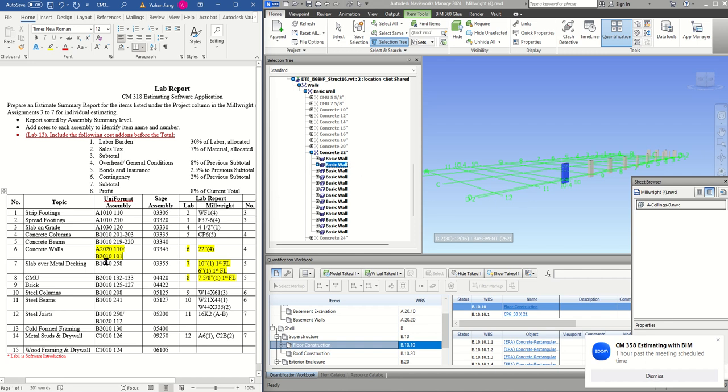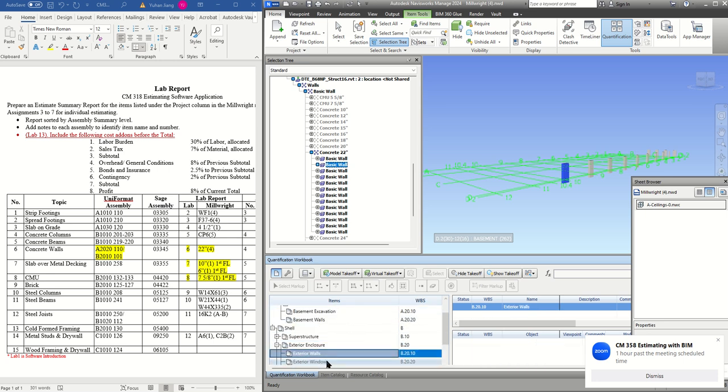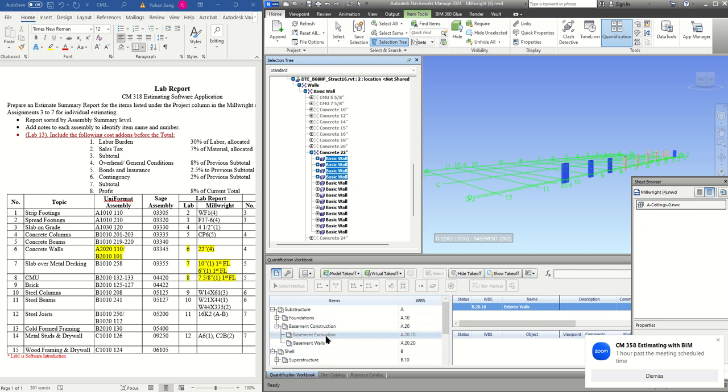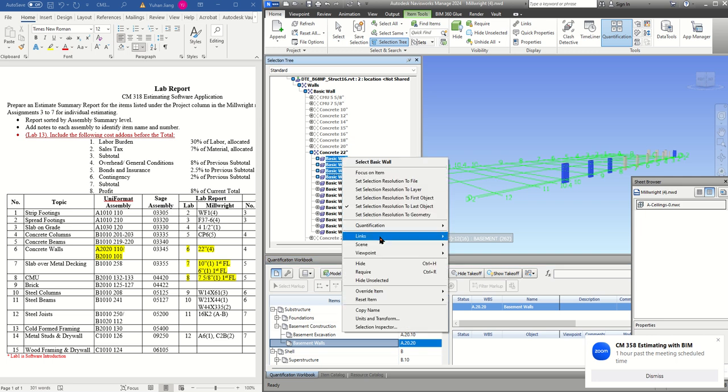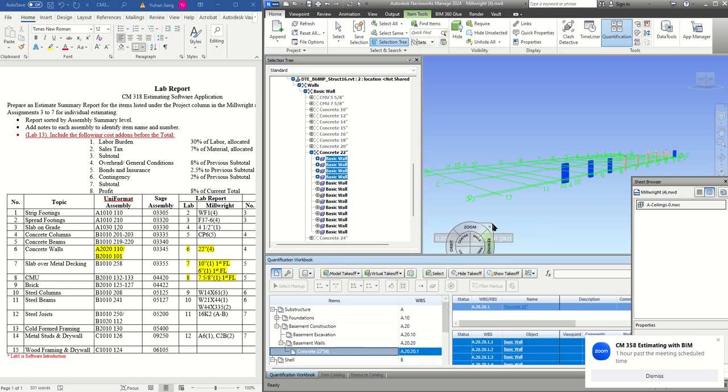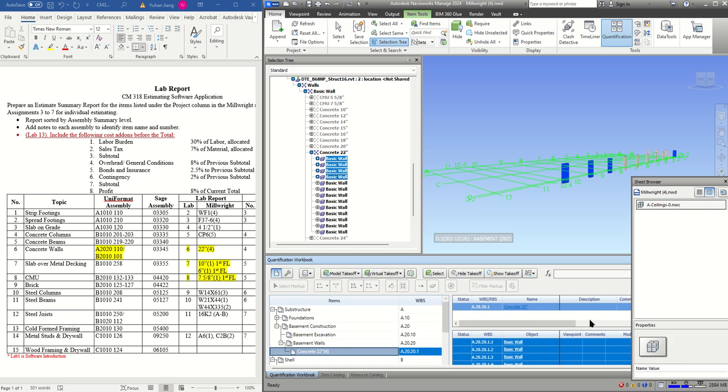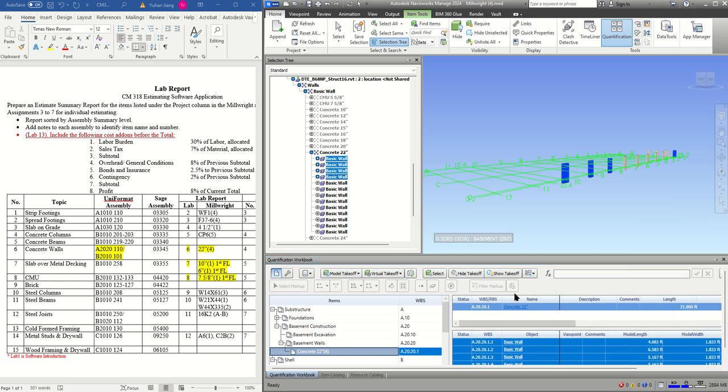So basically you can decide either to take this out to A20 or to the B2010. So this one is wrong. I should be using this B20 and then you will see the wall, right? This is for the external wall. So in our case, you can pick any of those 4, and then you go to the basement wall. You highlight this basement wall, and go back here to do the takeoff. And you will see you have 4 entries over here. That is for your basement wall.